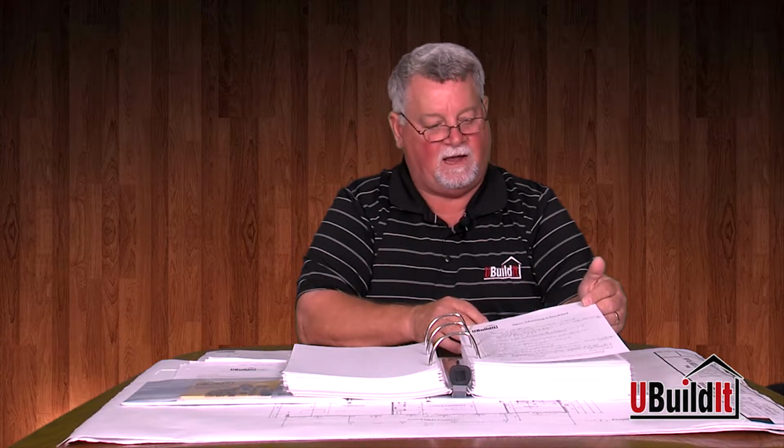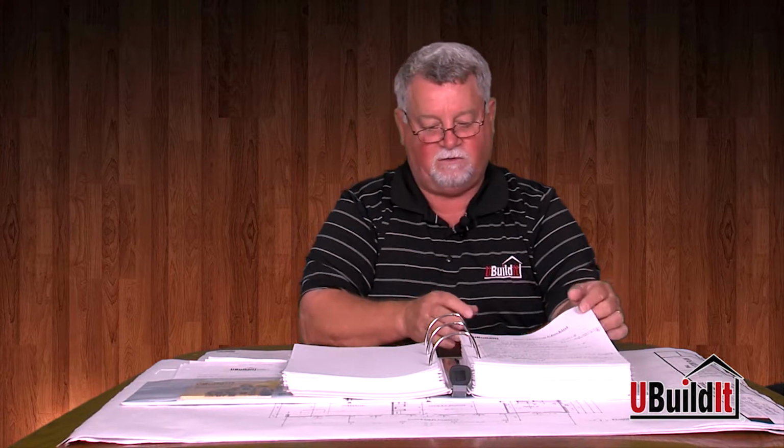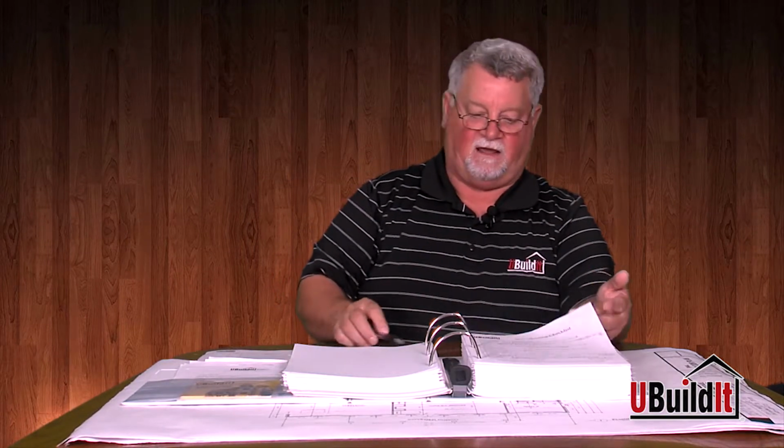I've had clients go back in the past and say, oh no, I'm supposed to have hardwood floors throughout the whole house. Well, your budget shows that you only have stained concrete. So we can go back through the manual and pull out this spec meeting checklist, which was done in their own handwriting, signed by them, and it says stained concrete. So they can't come back and say we discussed this if we didn't, or this is what I'm supposed to have.